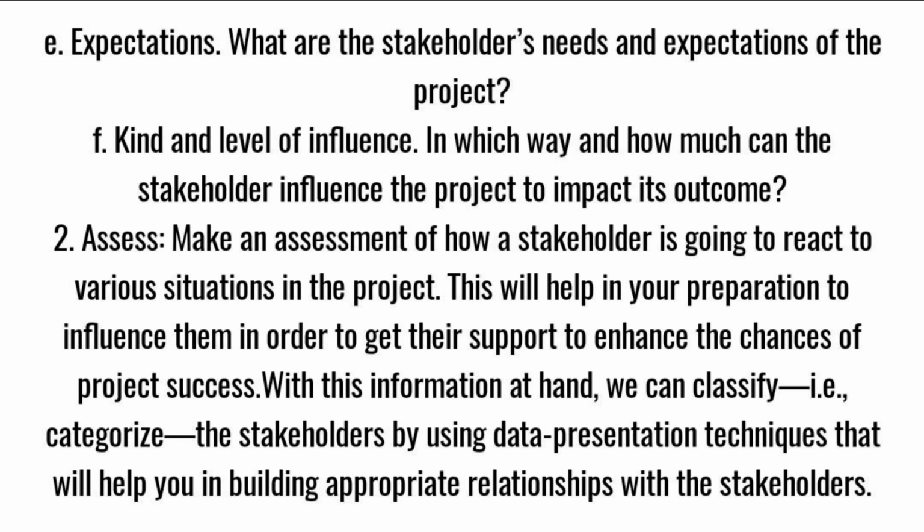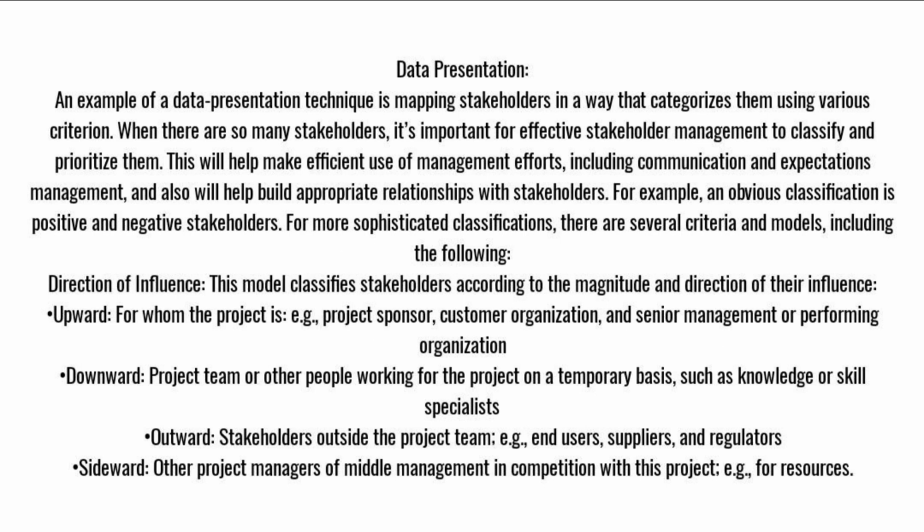2. Assess. Make an assessment of how a stakeholder is going to react to various situations in the project. This will help in your preparation to influence them in order to get their support to enhance the chances of project success. With this information at hand, we can classify, i.e., categorize, the stakeholders by using data presentation techniques that will help you in building appropriate relationships with the stakeholders. Data presentation. An example of a data presentation technique is mapping stakeholders in a way that categorizes them using various criteria. When there are so many stakeholders, it's important for effective stakeholder management to classify and prioritize them. This will help make efficient use of management efforts, including communication and expectations management, and also will help build appropriate relationships with stakeholders. For example, an obvious classification is positive and negative stakeholders.